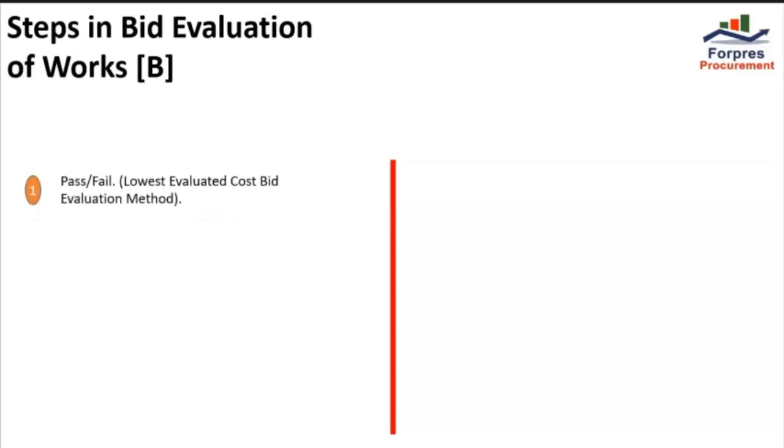Number one, the most common methodology in technical evaluation in works procurement is on the basis of pass and fail. That is the lowest evaluated cost bid evaluation method.